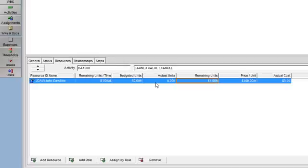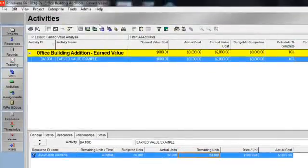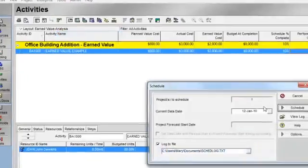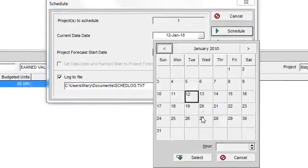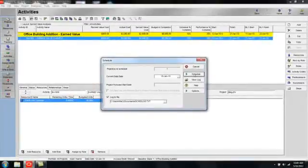I'll report the actual units that this resource spent, and that will be 30. Now I'm going to re-forecast my schedule as of my new data date, which will be January 18th, 2010. Back up to Tools, Schedule, advance my data date to January 18th, and I'll click Schedule.